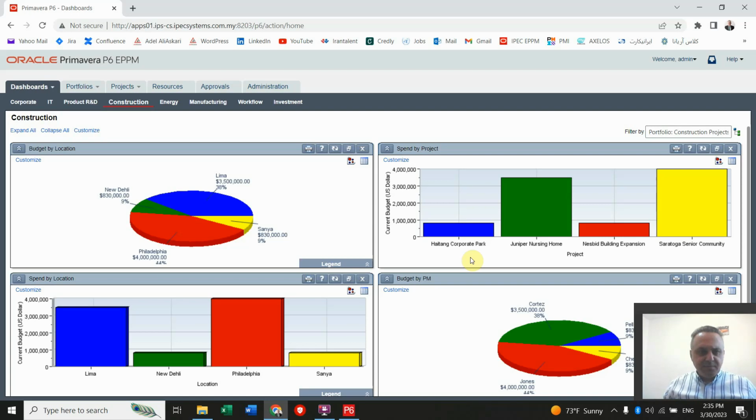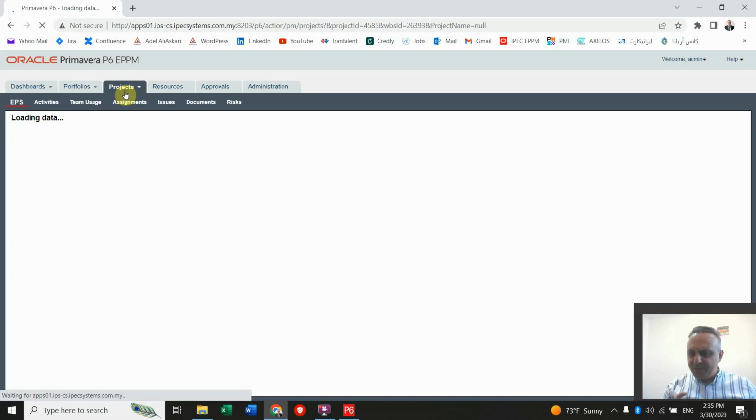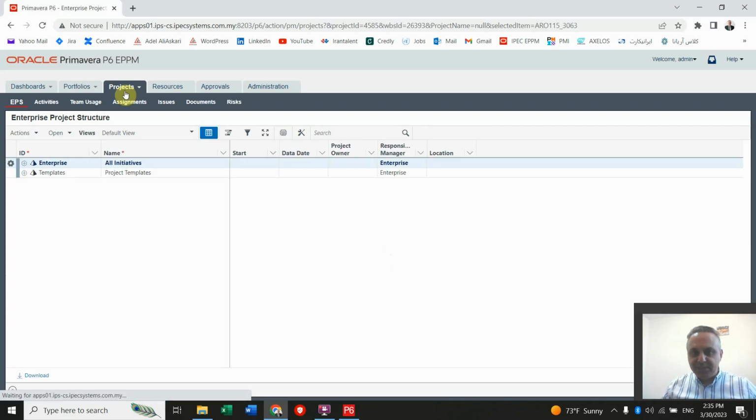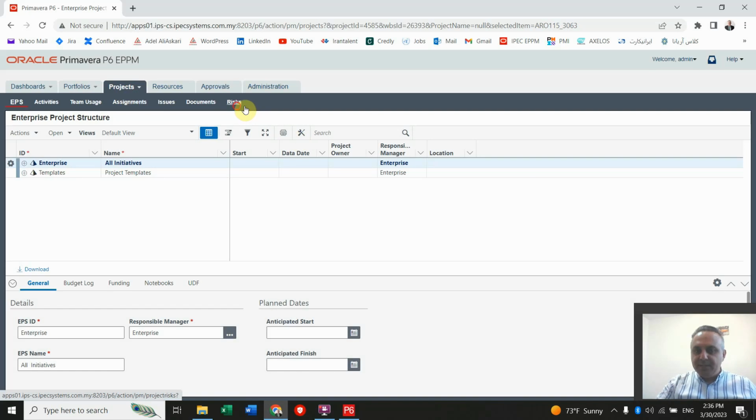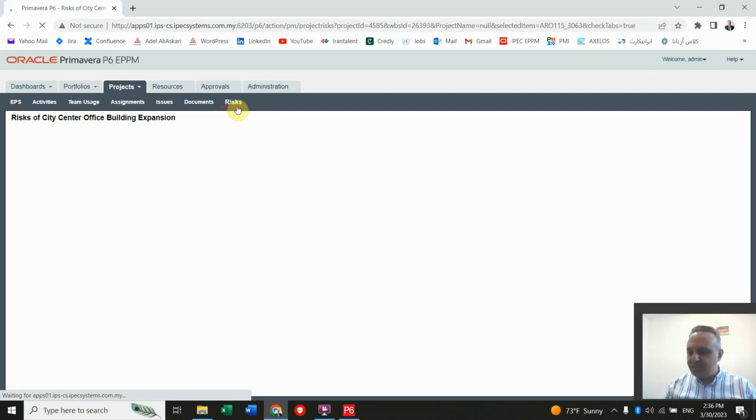The other difference between P6 and EPPM goes to the approval and also the risk topic. We already had a few small options in P6 to only document the risk of the project, but we have more options here to do qualitative risk analysis. We can categorize the risk in the P&I, probability and matrix index here. But anyway, the modeling, simulation, and getting results from the risk analysis is still not available here.